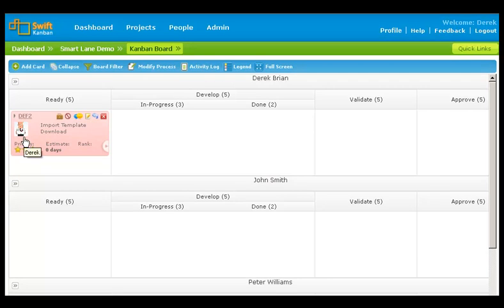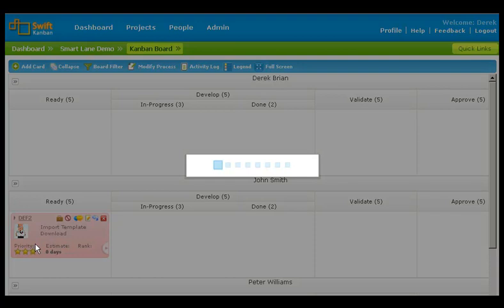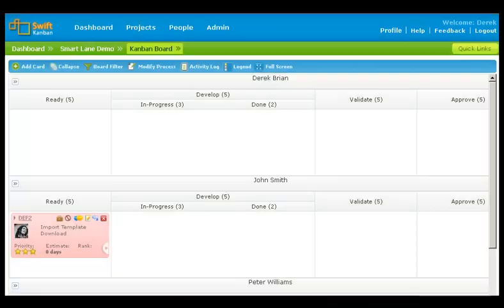If you have enabled smart lanes based on team members, you can move the card from one team member lane to another. So now the card owner has changed from Derek to John.